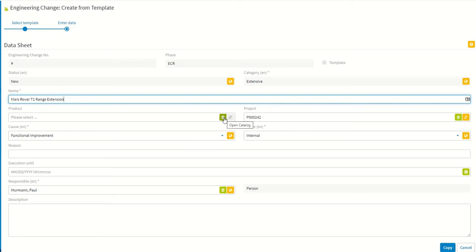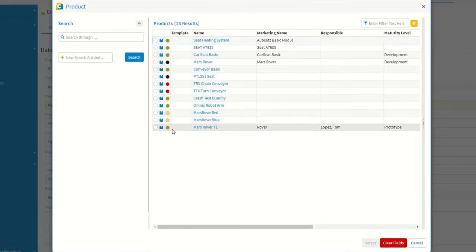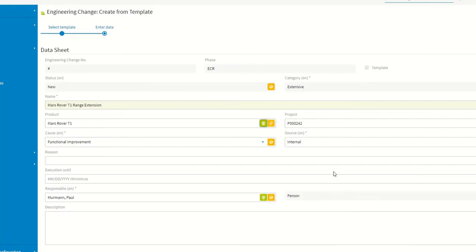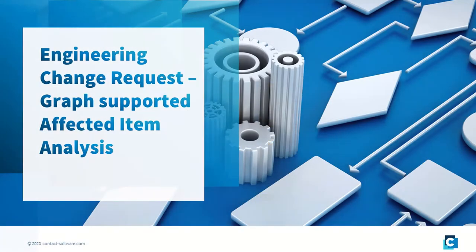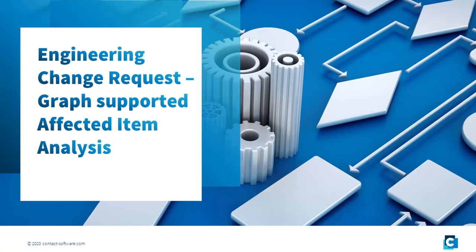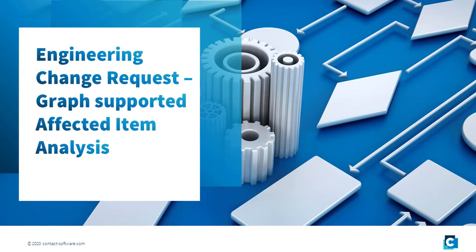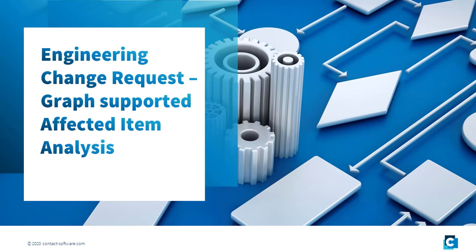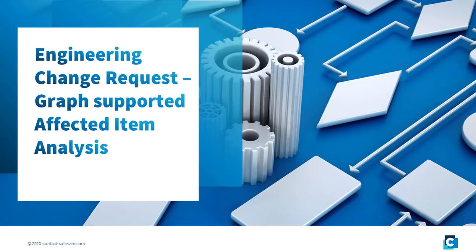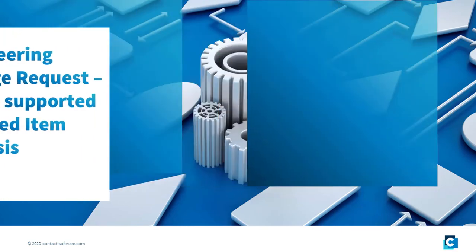The change project is then linked directly to the product and its descriptive data. Initially, an affected item analysis is performed to identify business objects such as parts, CAD documents, requirements, or any other object that might be affected.